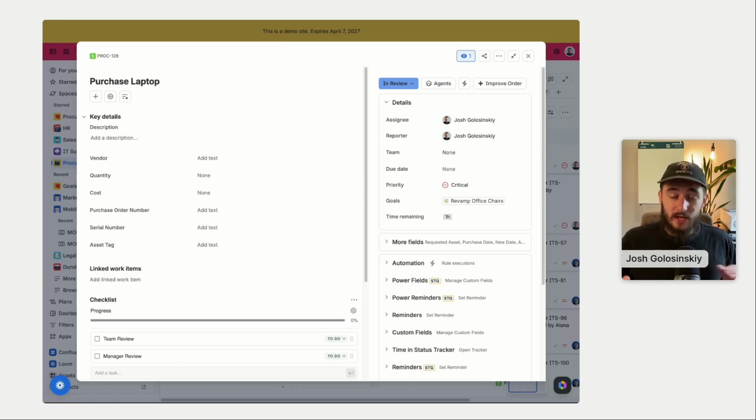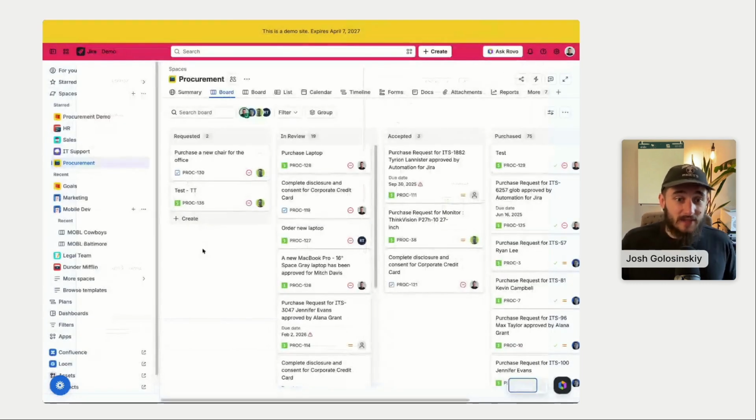And once you get that fundamental baseline project creation correct, everything built on top of it is going to be a million times easier. Because the moment you create a software space for a business team, I don't want to say there's no going back, but it's really a full migration to get them into the right space after that. And those business spaces are very, very specifically meant for non-technical teams, and they are phenomenal for the exact teams that need to use them. So that's by far the biggest mistake I see made. And that's really all we need for the execution layer inside of Jira.